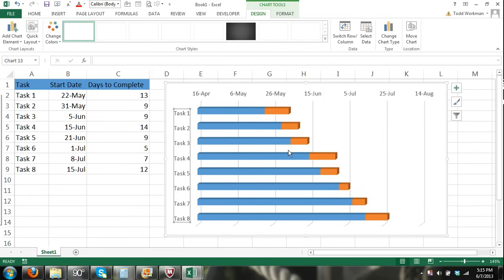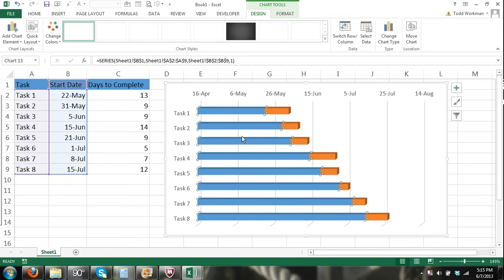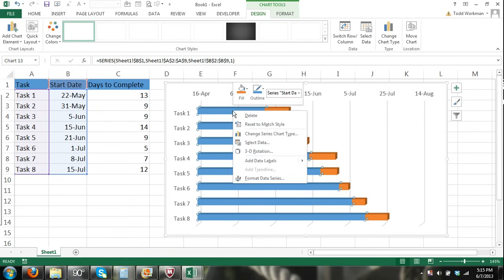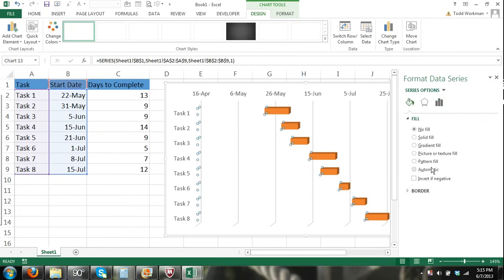Next, let's get rid of the blue bars — nothing is happening during that time so we don't need bars representing the start date. Click on those blue bars, right-click and select Format Data Series. In the Format Data Series panel, click Fill and select No Fill, then close the panel.